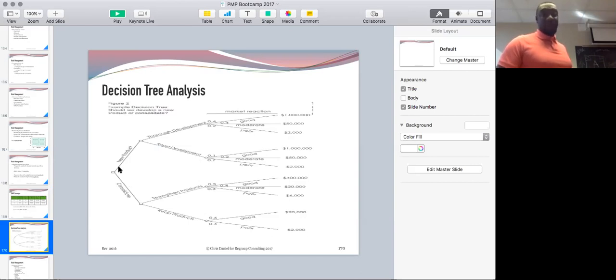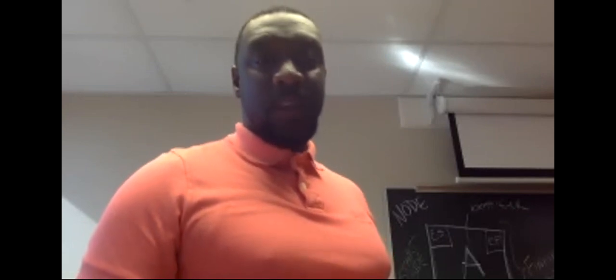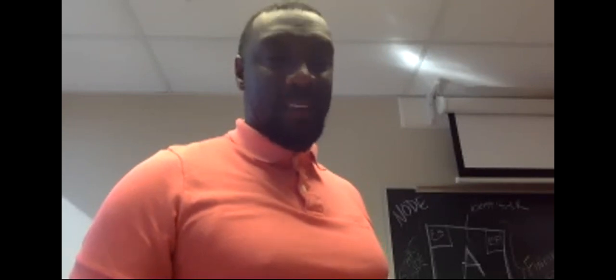So if I were to say, for example, we're talking cost, the cost of creating a new product through rapid development, I would go new product, rapid development, and let's say we wanted a good product. I'd take this 0.1 probability times our impact, $1 million. I'll do the math, come up with my number, and select between A, B, C, and D, which is closest to that number. Real simple. That's expected monetary value, EMV.